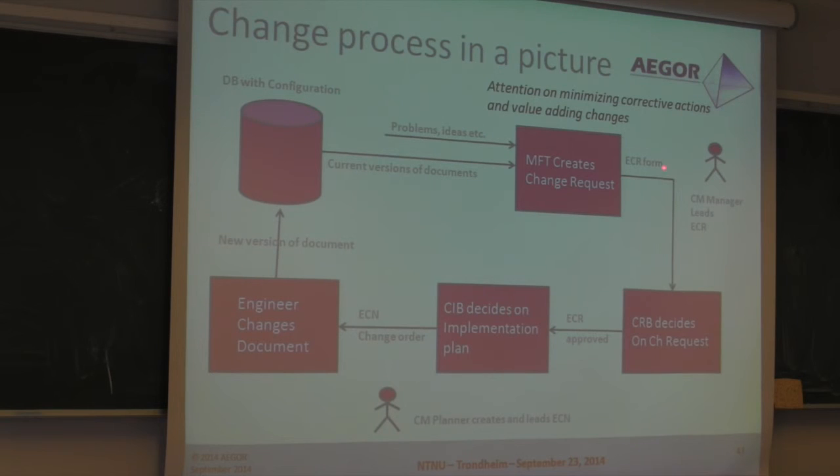We see here 3 forms: the ECR, Enterprise Change Request form. In fact, that's the form where the proposal is, with some standard answers and a lot of attachments with all consequences, etc. We have the next form, that is the ECM.